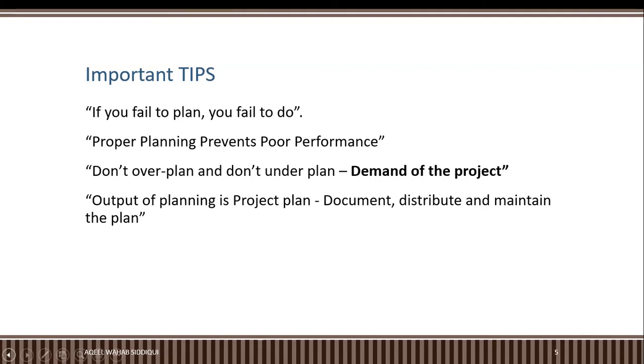So obviously it's your responsibility to manage such things. Next step is you take the scope statement and further explain your project graphically, and that is called the work breakdown structure. Based on the work breakdown structure, we produce the WBS dictionary.